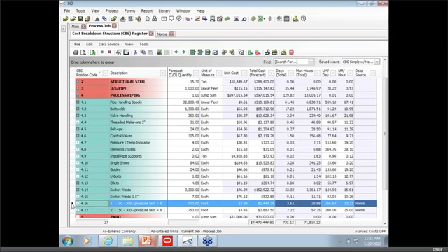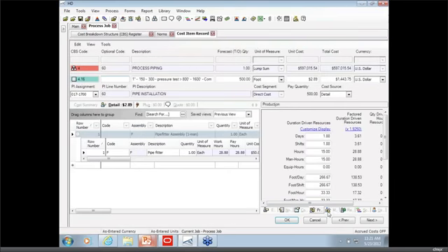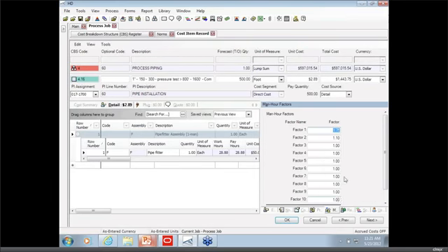Yeah, and just to add to that, going back into that cost item record, we can see the man-hour factor that was applied to this particular cost item that we brought in from norms. So to account for those geographic or regional costs, we could simply change our composite factor right here based on those conditions, either at an item-by-item level or at a global level.